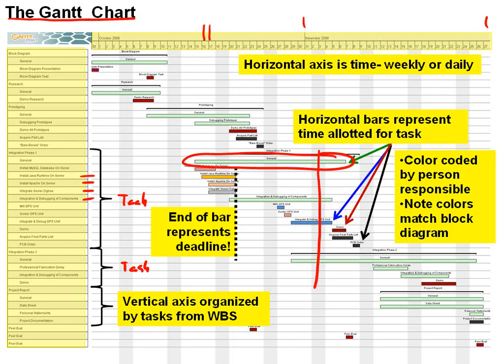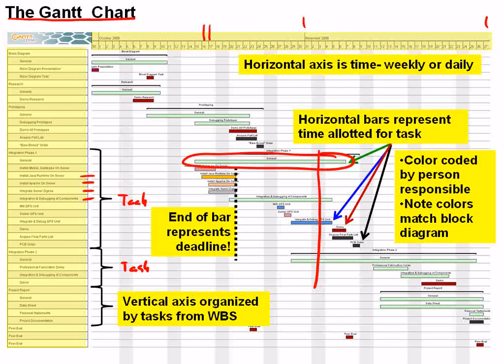One thing that should be obvious, but a lot of people really don't understand, or at least don't take deep into their heart, is that the end of the bar represents a deadline. This is when something is due. If you don't have your work done by the day that bar ends, the entire project needs to get shifted, the Gantt chart gets reorganized and changed, and you eat up a lot of additional time and other resources and meetings to redo the project management. So be aware that once you make a Gantt chart, you have set yourself some very firm deadlines for getting things done.